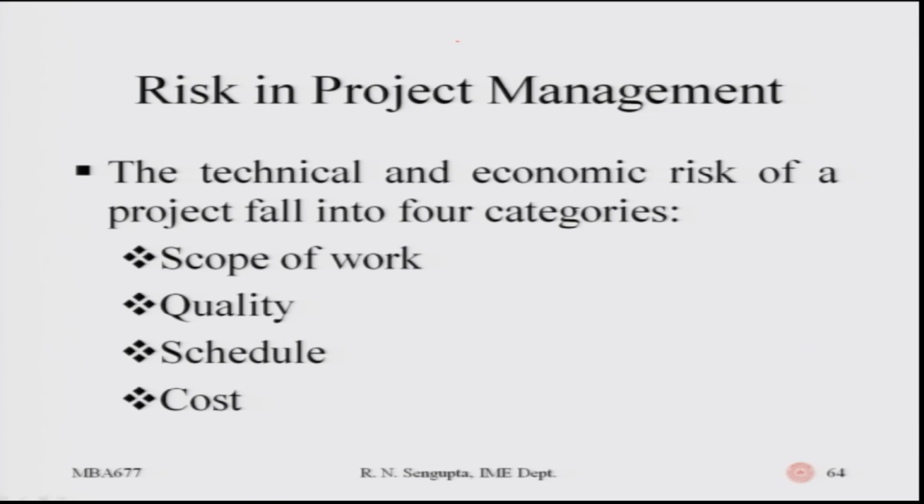So, depending on the cost structure which I mentioned, if you overstep your schedule, a penalty is there, but obviously on the other side, if you are able to finish your work well before time, you will get some benefit. So, in that case the loss would be considered as negative, which means a profit is coming into the picture. So, that can be considered as a sort of negative risk, which is profit.